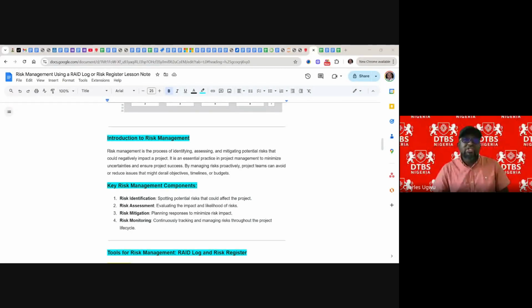So we have what we call risk transfer and risk ownership. At times, when things happen, when risks have already happened, we deal with it. How do we deal with it? You own the risk. Some risks cannot be transferred, so we own them. That's why we've captured such risks in our project. We assign an owner within the internal team to plan and resolve that risk.